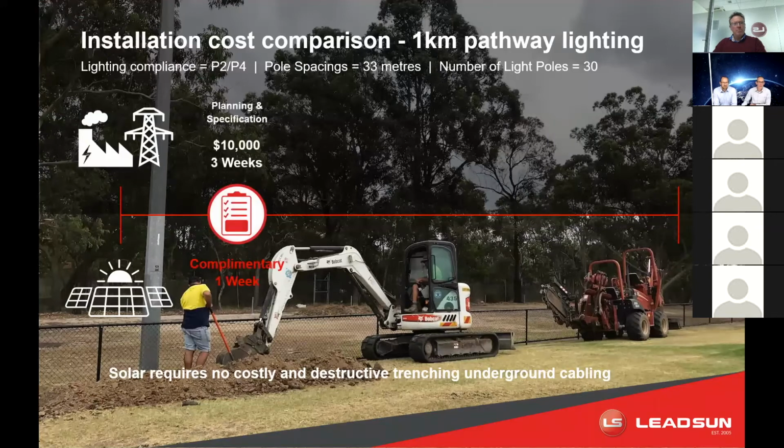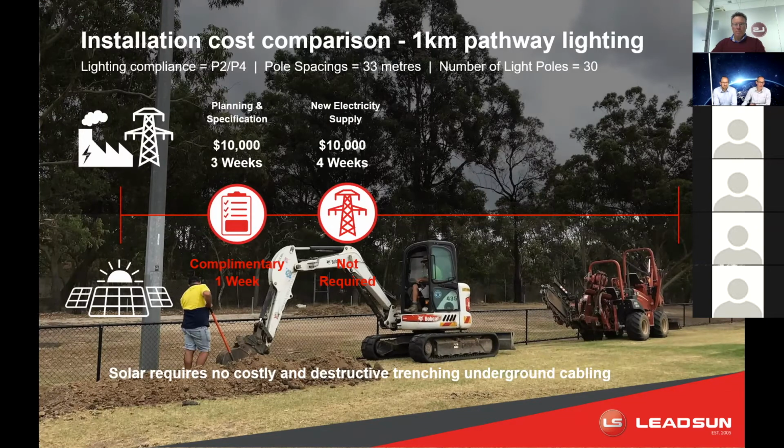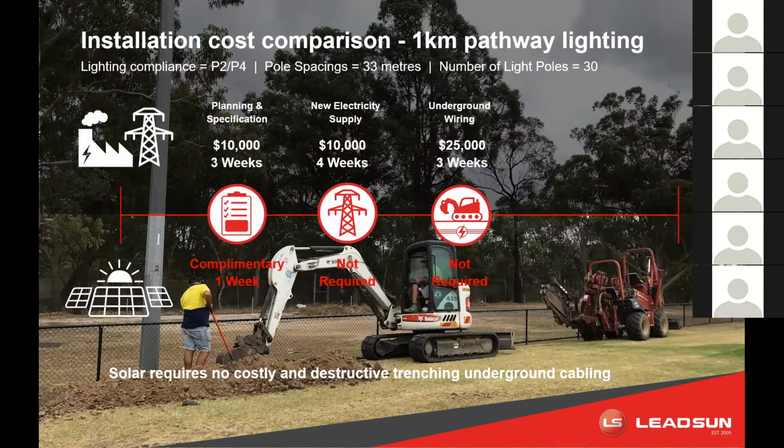So firstly, planning and specifications. It's $10,000 in 3 weeks for the grid lighting, and it's complimentary in 1 week for the solar lighting. For the supply of the new electricity supply, so getting electricity to the site, $10,000 and 4 weeks. For solar lighting, it's not required. For the underground wiring, $25,000 and 3 weeks, but for the solar lighting, once again, it's not required.